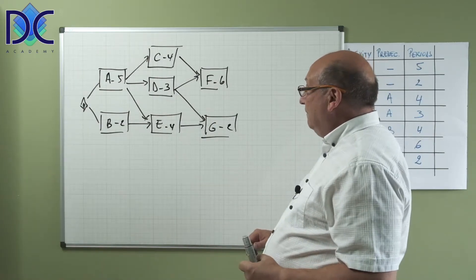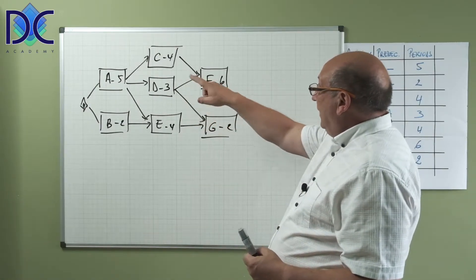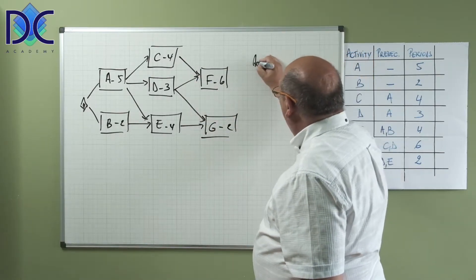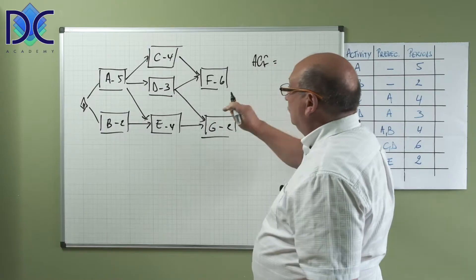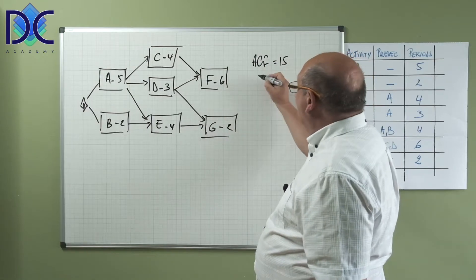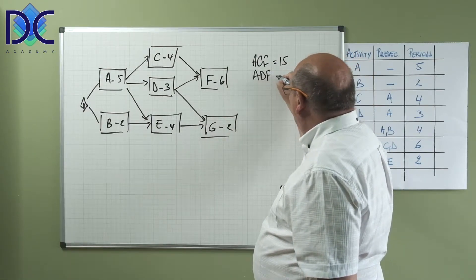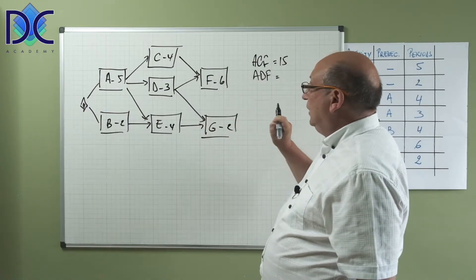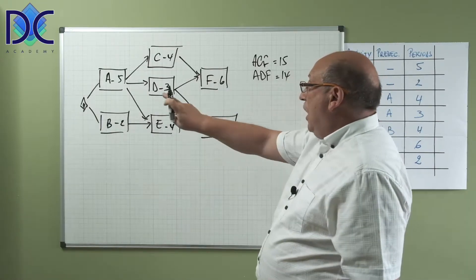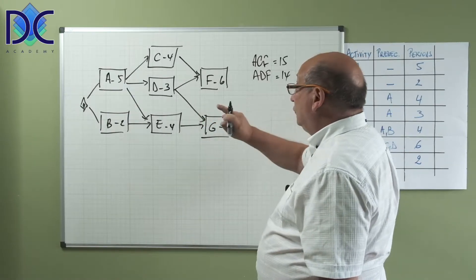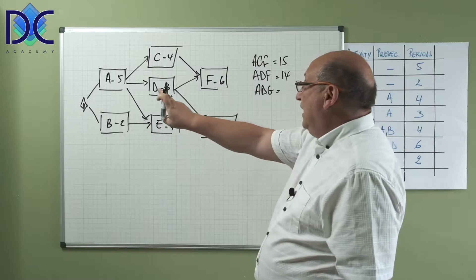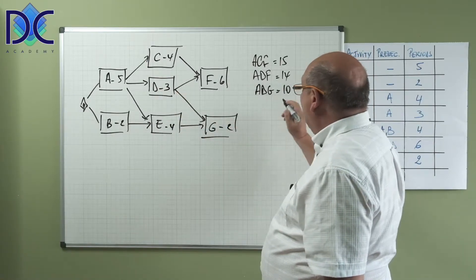Now, what are the paths through the network? We have ACF which has a duration of 5 plus 4 plus 6 is 15. ADF, which is 5 plus 3 plus 6 is 14. ADG, we have 5 plus 3 plus 2 is 10.